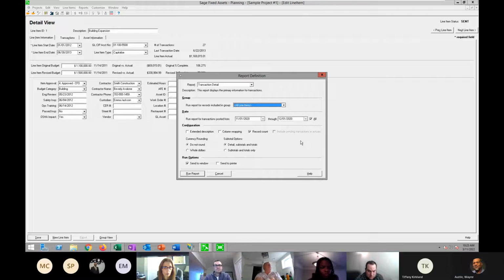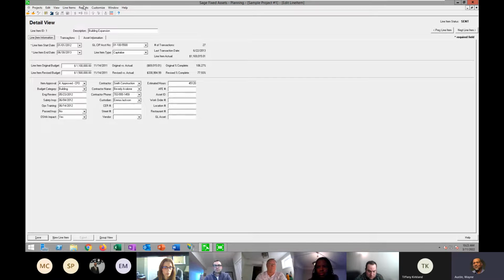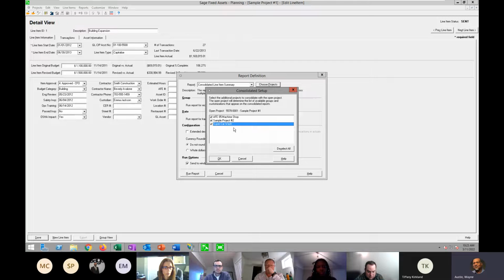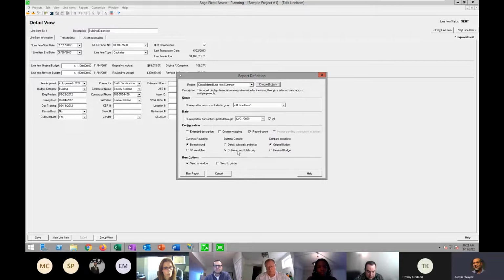All right. And probably the other thing you're going to want out of here, because someone is going to want the high level. So let me actually show you this consolidated view as well. So you've got, let's say, multiple projects going. In addition to the project you're in, I can choose any of my other projects. In my case, I only have 4 in total. And I can look at this in just a subtotal view or in full detail against either set of numbers, either the original or revised budget. And I can even limit this to looking at transactions posted through a particular date.